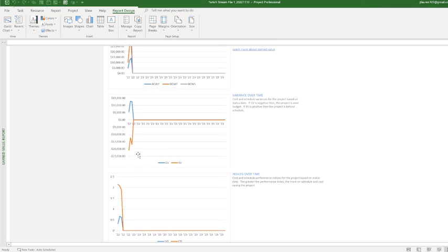And you're probably going, well, wait a minute. There was one task that was over budget, but that's just one task. One task does not affect the entire budget, because you can make it up in other areas. So keep that in mind. That's why we talk about alternative analysis, right? Alternative analysis is finding ways to do things better, faster, cheaper. Sometimes that also means, yeah, we might take a hit at this task, but we can make it up for this other task. And that's the whole point of analysis and alternative analysis.